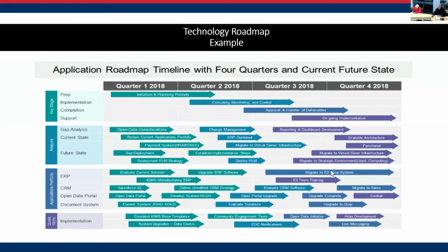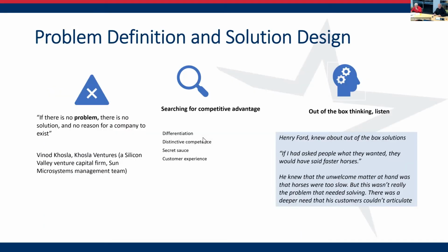Keep in mind, if you're involved with significant technology development, holding people to milestones is critical, or you just keep spending money over and over again, and the world of technology development is littered with overruns in terms of cost if you don't hold and keep working to milestones along those lines. And product and technology roadmaps can be very, very helpful as you make your way through defining the products and services that are going to make up your commercial venture.